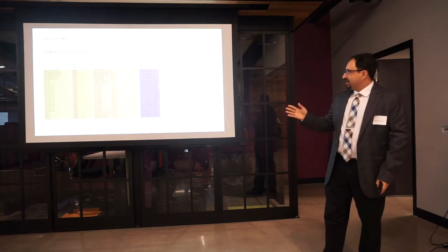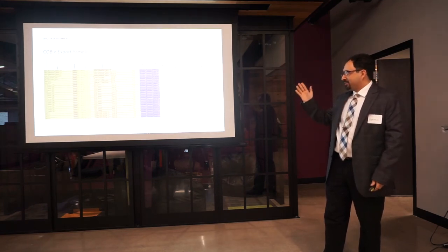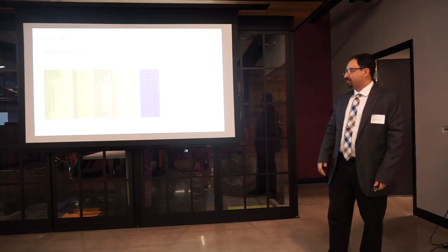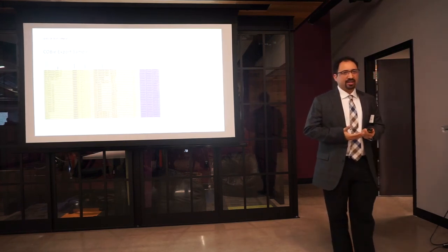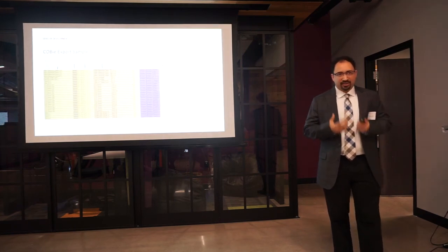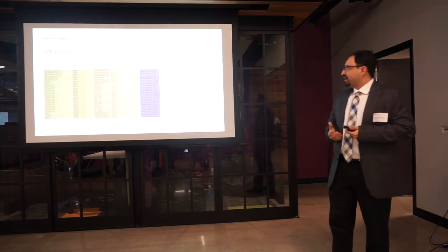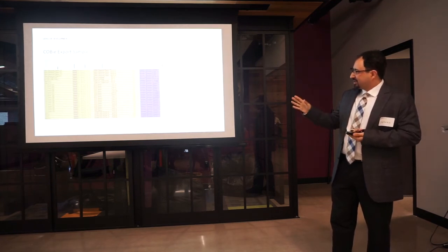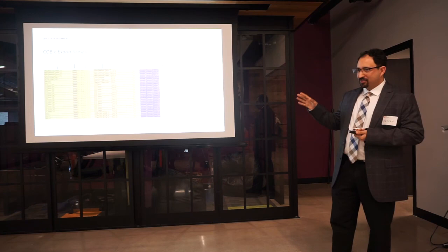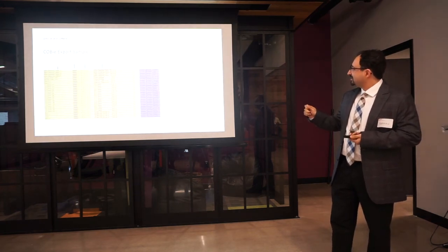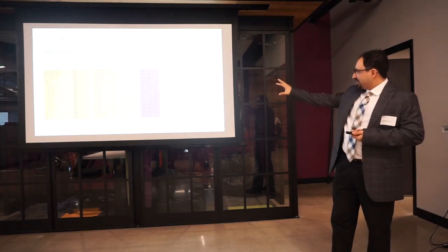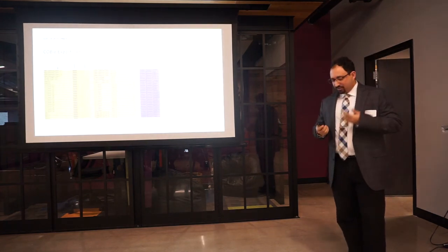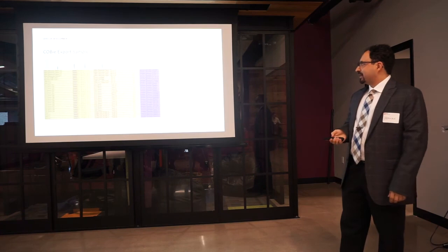The architecture team and the engineering team were all responsible for everything left of the purple, while everything right of the purple are the facility management team and the construction management team, where we are in charge of the type, the space, the description. This is a little earlier before our final export, unfortunately, I just realized. However, they insert their serial, the installation date, warranty date, and all sorts of information for that development.